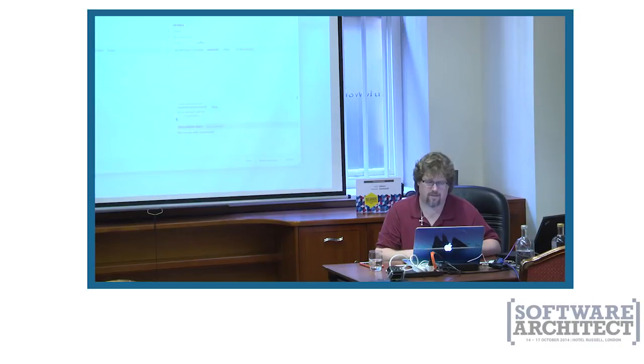For example, I'm going to assign this to myself, and I'll save this. And then I'm going to change the state to approved. And then notice it shows you that state transition. It went from the new state to the approved state, and Brian did that. You can also add history comments. And I can assign an effort in something like story points. So I can say this requires 50 story points. The business value is 100, very high.